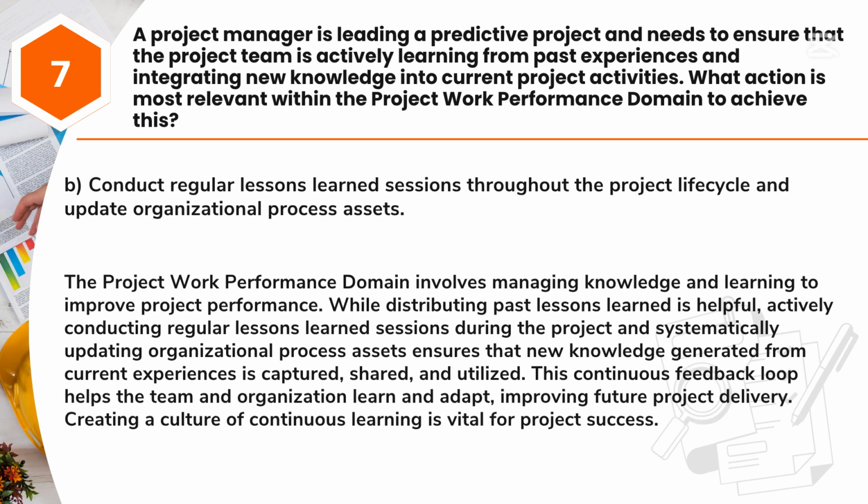Answer: B. Conduct regular lessons learned sessions throughout the project lifecycle and update organizational process assets. The project work performance domain involves managing knowledge and learning to improve project performance. While distributing past lessons learned is helpful, actively conducting regular lessons learned sessions during the project and systematically updating organizational process assets ensures that new knowledge generated from current experiences is captured, shared, and utilized. This continuous feedback loop helps the team and organization learn and adapt, improving future project delivery. Creating a culture of continuous learning is vital for project success.